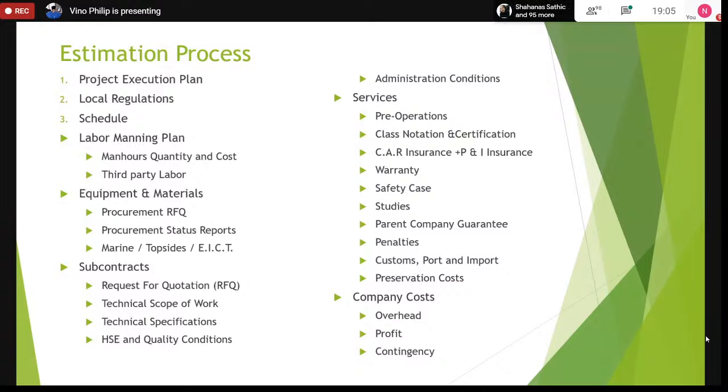There will be 3 or 4 different subcontracts, one to Brazil, one to China, one to Singapore, for 3 different yards that we are fabricating different components. And also the repair and conversion subcontract involves the shipyard repairing the existing vessel and changing some of it. They'll have to stiffen the plates. You know, the deck, we buy an oil tanker.